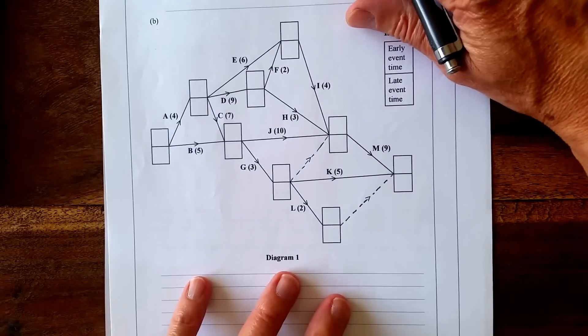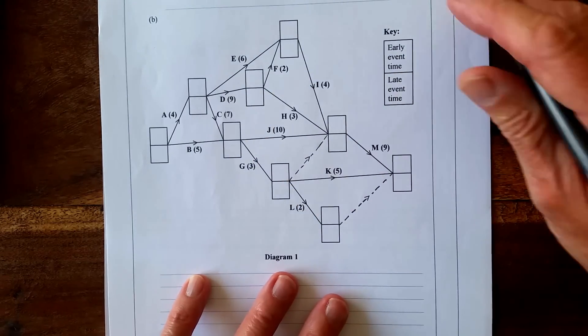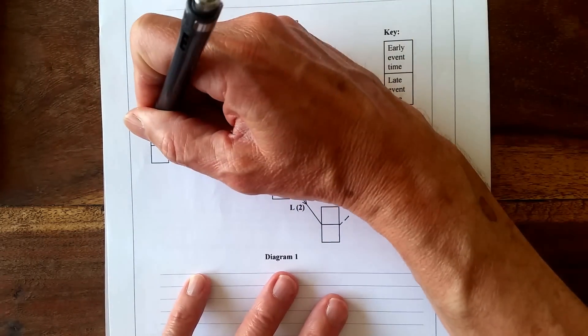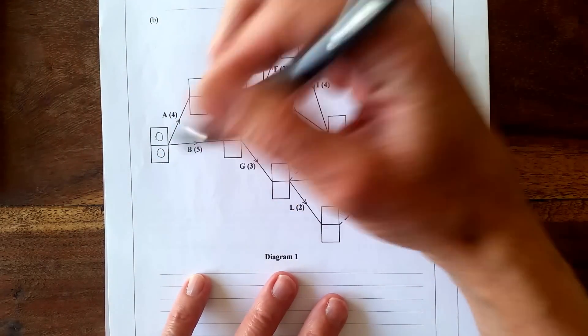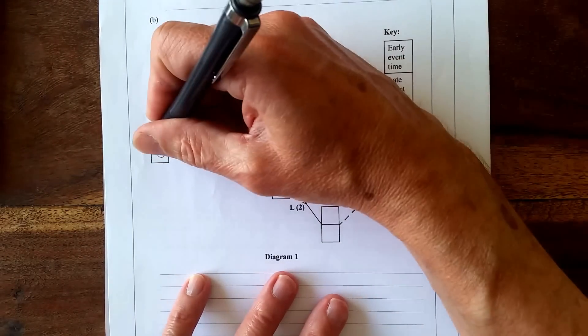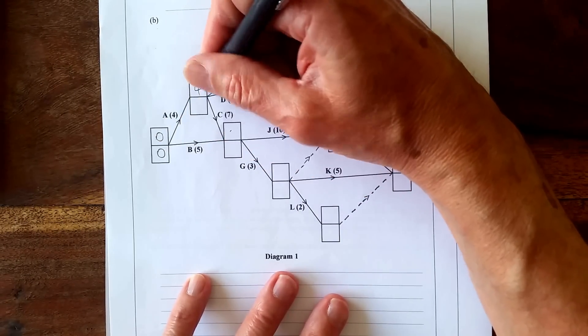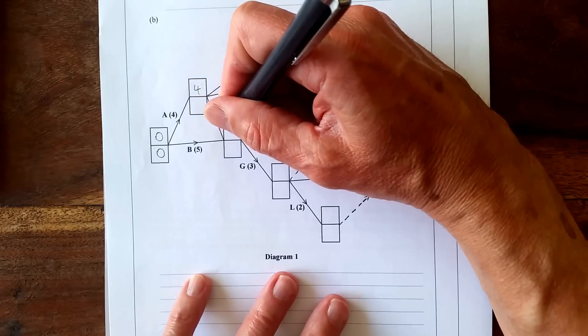When you go forward through, you do a forward pass, you want the biggest number possible. So you start with 0, 0 here, and let's go through them: 4, and then 5 here, but 5 from there, 4 plus 7 is bigger, so it makes that 11.